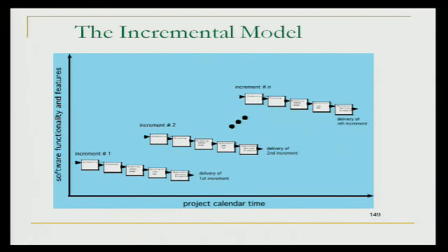Okay. Now incremental is, the way I describe this, a lot of mini waterfalls, over and over again, producing more and more capability each increment, right? So with an incremental approach, what you do up front, first of all, is a little bit of what's called increment planning. With increment planning, you decide, okay, how many increments do I want to have?